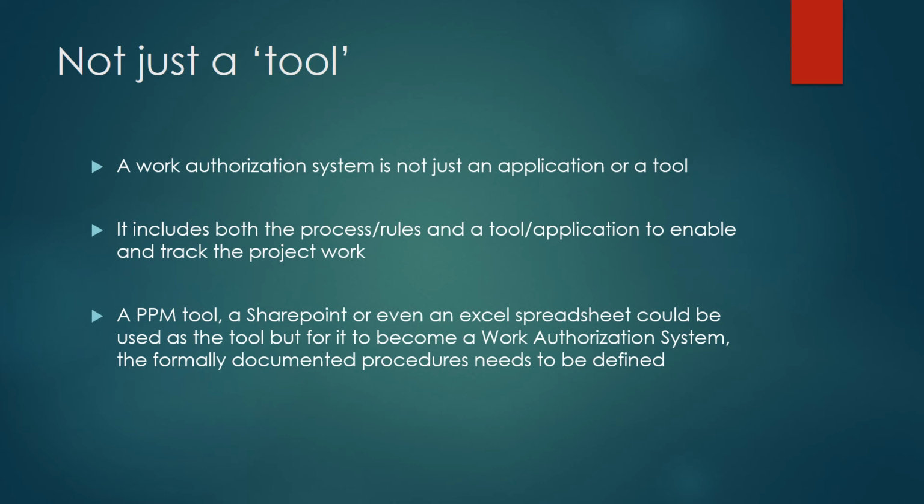So you've got a PPM tool, you've got SharePoint, or even an Excel spreadsheet, right? It can be used as the tool. But for it to become a work authorization system, the formally documented procedures need to be defined. So the procedures that we talked about in the previous slide need to be defined. For these tools, the PPM tool, the SharePoint tool, or the Microsoft Excel tool, to be used as a work authorization system, those formally documented procedures need to be defined.